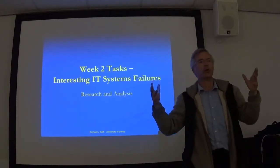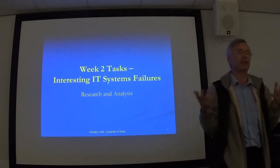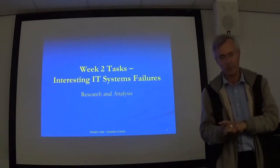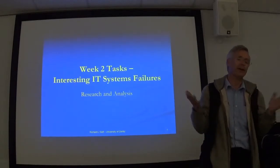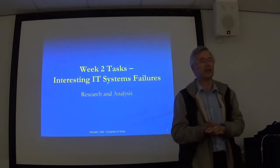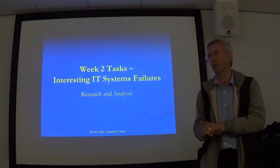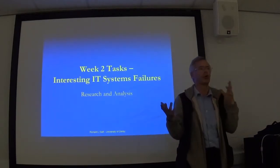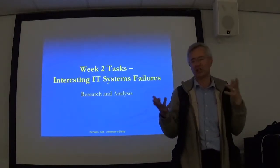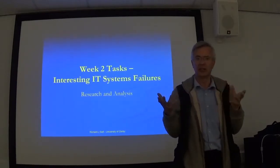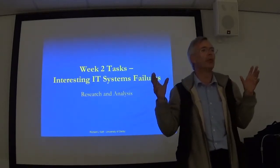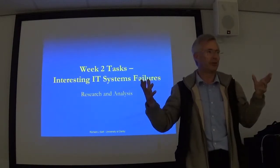In the middle are what they call 'challenged' projects. These are typically late, over budget, and deliver only part of what the customer contracted for — typically over budget by 40 to 60% or more, often taking twice as long, and delivering typically about 40% of the contracted functionality. In other words, it doesn't actually do what the real user customers want.